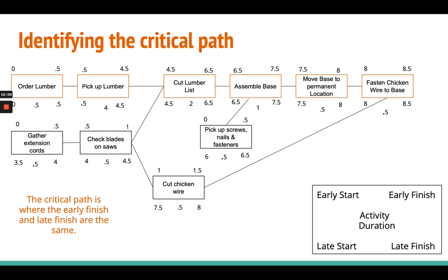So first of all, you identify the critical path by looking at any activities where the early finish and the late finish are the same. So here, early finish and late finish are the same, and I've highlighted our critical path.